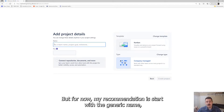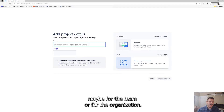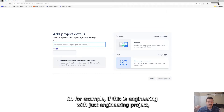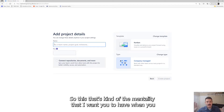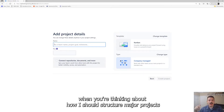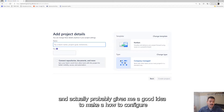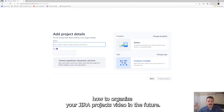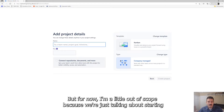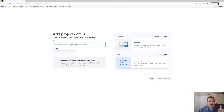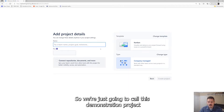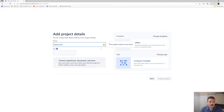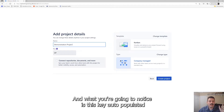My recommendation is to start with a generic name, maybe for the team or the organization. For example, if this is engineering, it's an engineering project. If this is for finance, it's the finance project. That's the mentality I want you to have. So we're just going to call this 'demonstration project.' What you'll notice is the key auto-populates, taking the first character of pretty much every word. So if you have four or five words in your name, the key is going to be four or five characters.